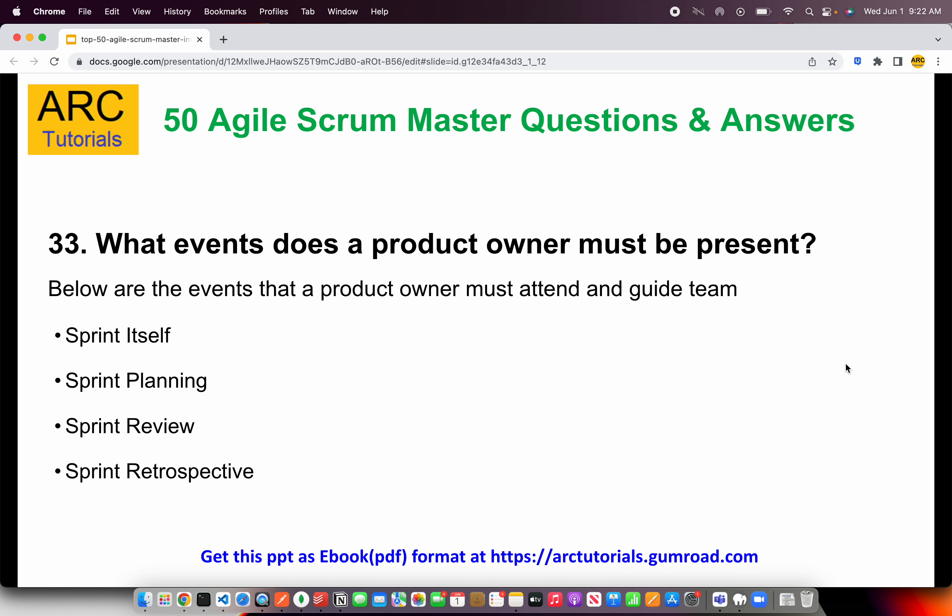What events must a product owner be present at? This question is often asked to understand the role of a product owner and how they contribute to the product goal. The product owner is required to be in every sprint planning, sprint review, and sprint retrospective — these are the important ceremonies the product owner must attend. Notice that the daily sprint standup is not included; the product owner is not required at the daily standup meeting.